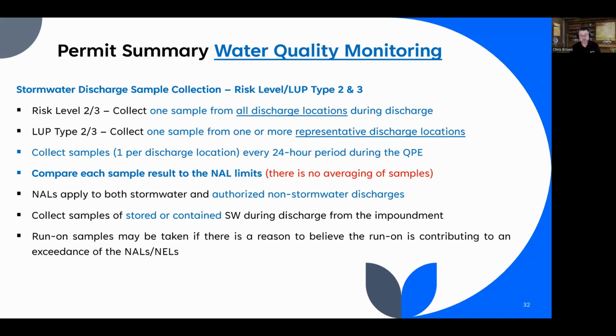And if you have stored or contained water, like in a basin or something like that, that water would be sampled when it's discharged. A lot of basins are set up to treat water for a couple of days and then it's released. So that would be a discharge, later on. So you would have to be there to collect the sample. Someone would have to collect those samples, right?